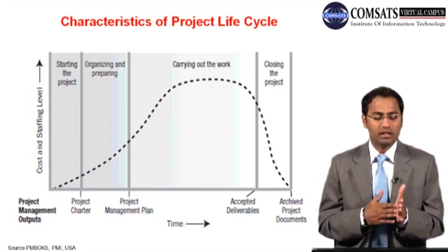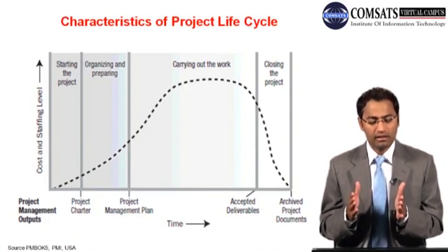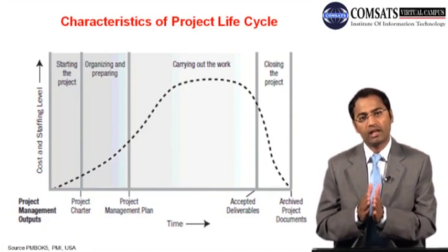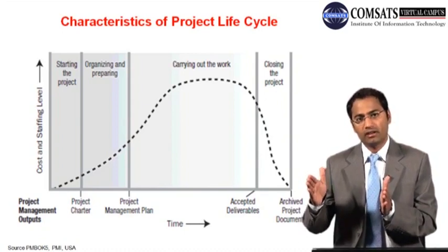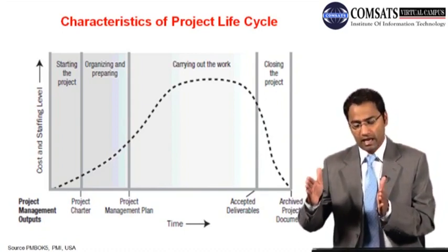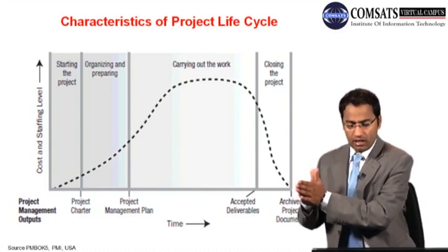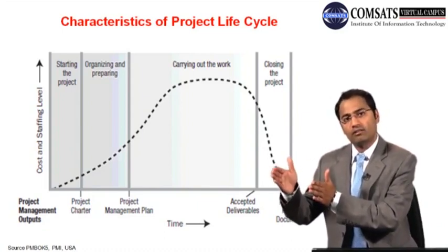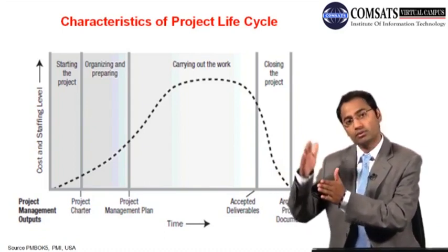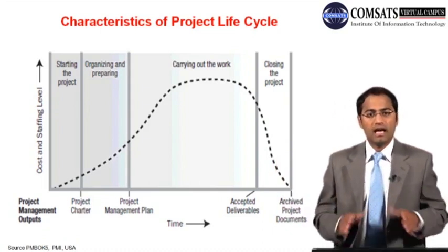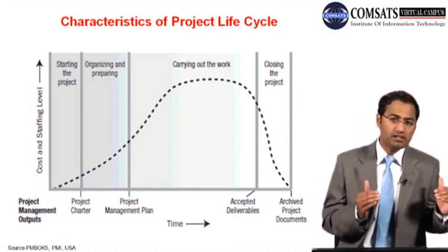So starting the project, and then you are reaching this project charter stage, after getting it approved you are actually organizing and preparing, kind of planning, and then you actually prepare the project management plan, then you carry out the work and then you create deliverables. Those deliverables are validated through quality processes and then handed over to the client or customer and those are accepted, and then you actually gain all the formal approvals and close procurements and close financial and you carry out necessary audits and stuff like that. Then you archive project documents, and these are few phases, you know, and cost and staffing level.